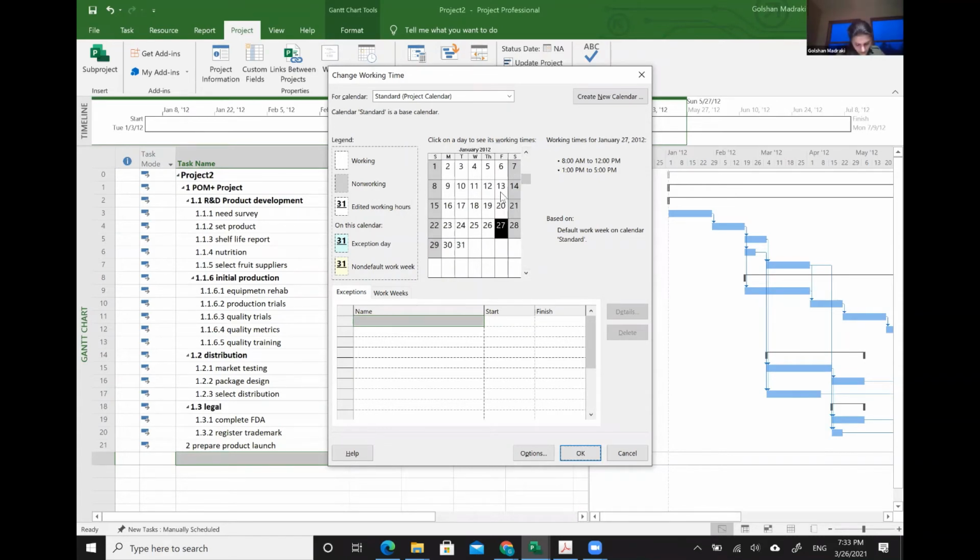So January 1st is a holiday, so it falls on Saturday. And please read the number 4. Number 4 said, if a holiday falls on Saturday, then Friday will be given as an extra day off. And if it falls on Sunday, then Monday will be given off.